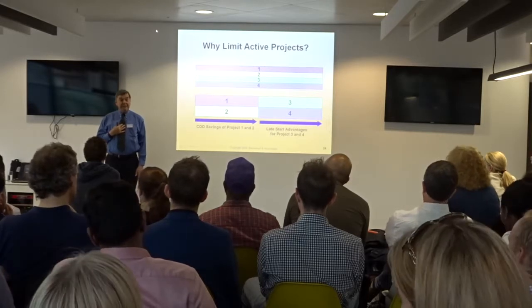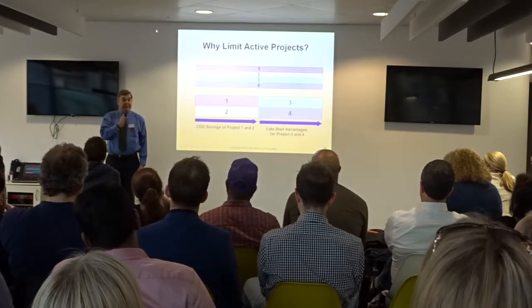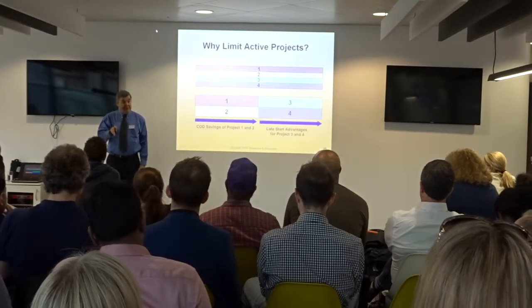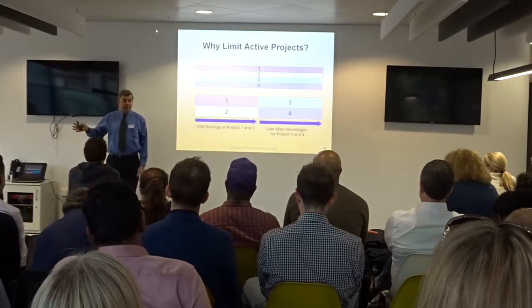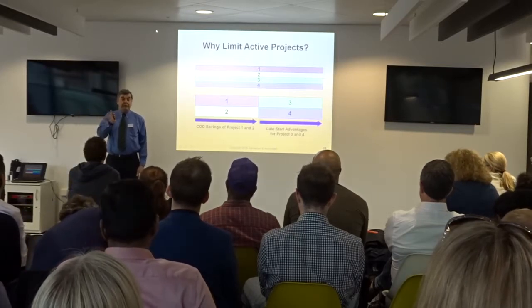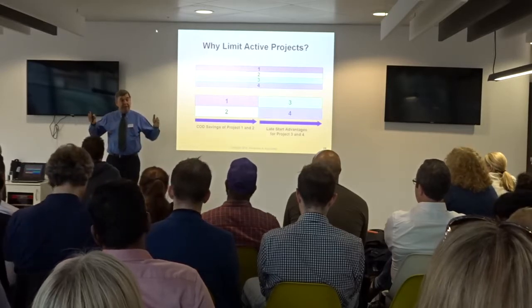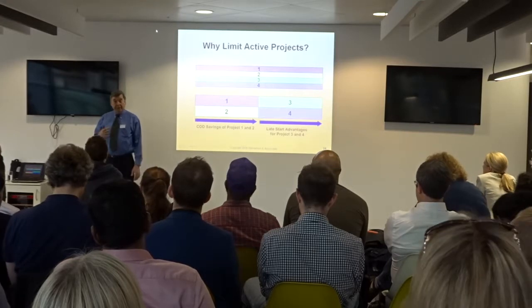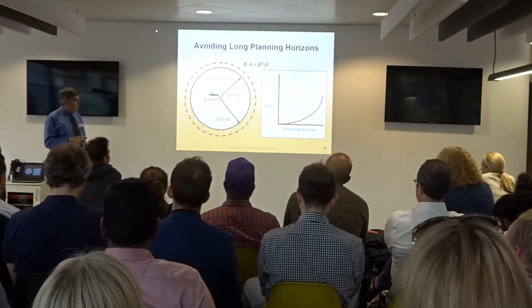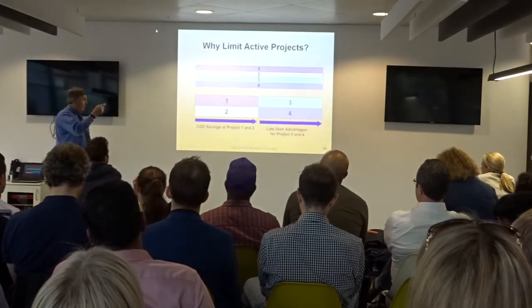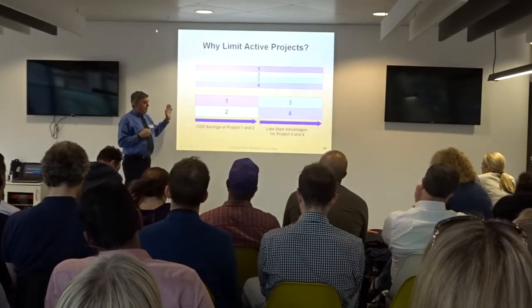In a capacity constrained system, what governs the rate at which you deliver stuff is the capacity of the system. It is not the amount of stuff you stick in the system. Starting earlier has no effect on causing you to finish early. All it does is raise the amount of WIP, dilute the resources, and ultimately it will end up slowing you down. I've got another diagram to use sometimes, but you need to convince people.